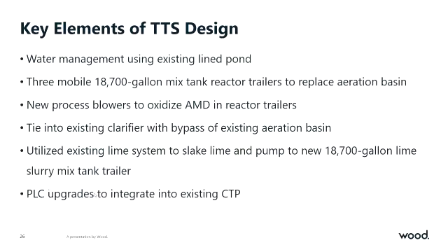And that was one of the key elements because it allowed us to integrate the temporary system into the existing CTP in a controlled environment, and then also to be able to remove the temporary system from the overall process control system for the new plant as well.